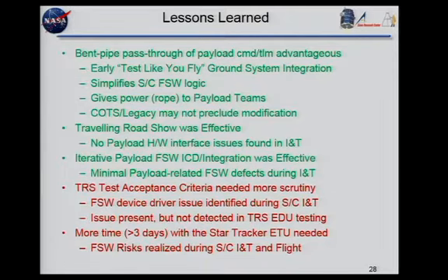In fact, on the next mission I'm working on, since we don't have the EDUs yet, we're designing it so that we can connect ITOS directly to the payload early on, like the Berkeley guys are doing. That way we can get end-to-end before we even have anything in the middle, and then put the flight software in the middle. And of course iterative development works well. Okay, I think I covered all that. And then the red ones to review: oh, I didn't cover this red one here.